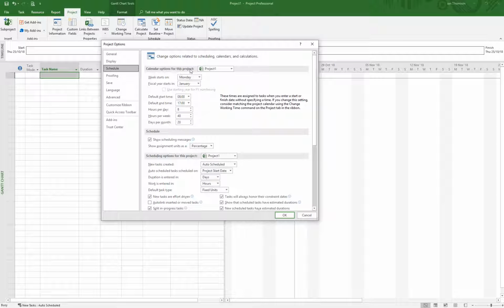This top section here is showing the work loading, so the amount of hours it expects in a week and each day. Because I've tweaked its standard, it still thinks it's using a standard. So I have to go in here and say, no, we're starting at 9 o'clock now and we're finishing at 5, apart from a Friday, but we'll get to that. We're working about 7 hours a day because we don't include the lunch from Monday to Thursday. In a week, we're actually working 34 hours because Monday to Thursday at 7 hours is 28, and then we have 6 hours on a Friday, which makes 34.